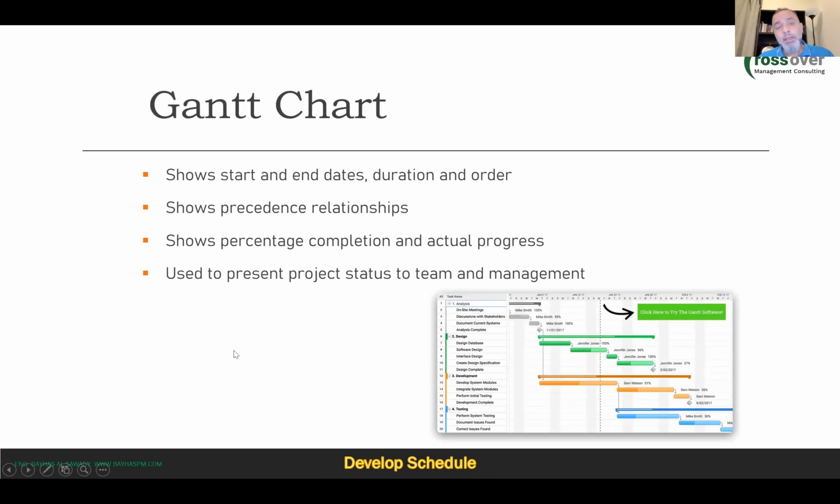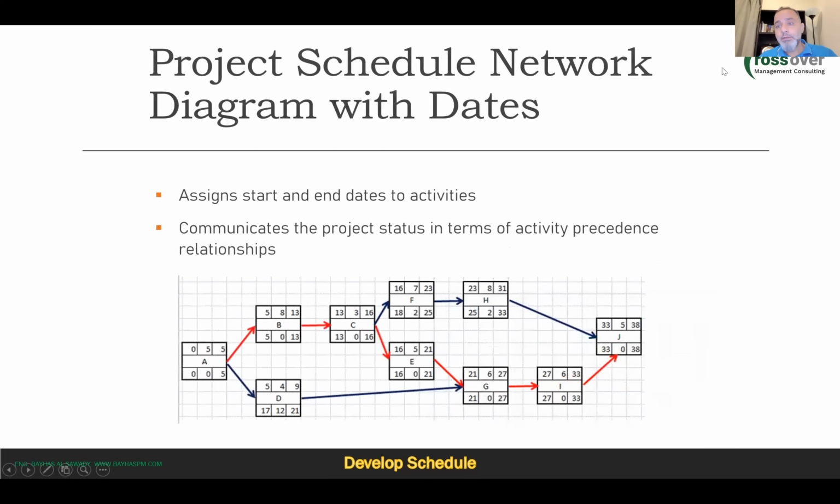Okay, and then when you do this, you can start creating the Gantt chart, right? As you've seen in Microsoft Project, you list those activities, you connect those activities, you review the relationships, you estimate the durations and so on. And of course, this is if you are using Microsoft Project and the Gantt chart, but if you are not using Microsoft Project, you can also use another way. And this is important, also a diagram that you can use, which is the network diagram.